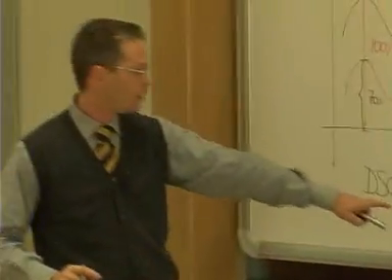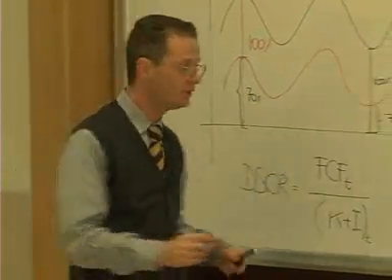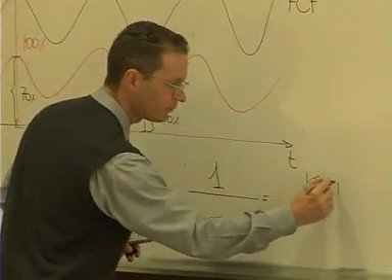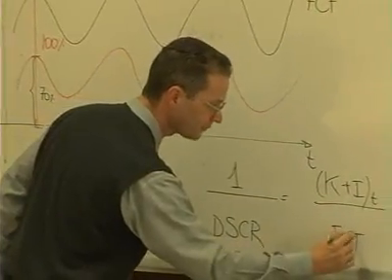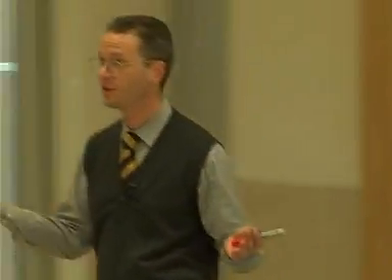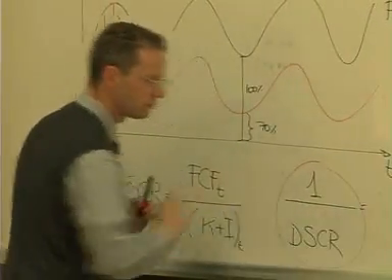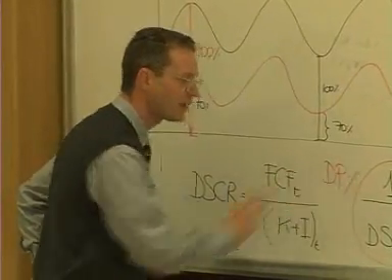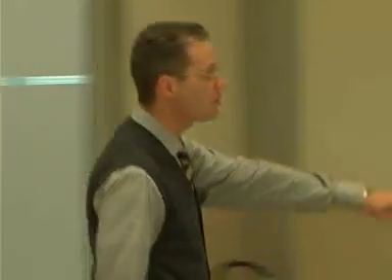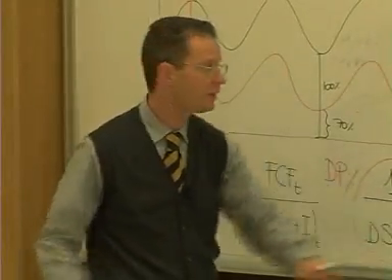is capital plus interest at time t over free cash flow at time t. It is very easy. Nothing changes. Okay? I have inverted the two terms of the equation. Now, call 1 over debt service cover ratio as DP percentage, where DP percentage is the dedicated percentage. Okay? You can rewrite this equation in this way.